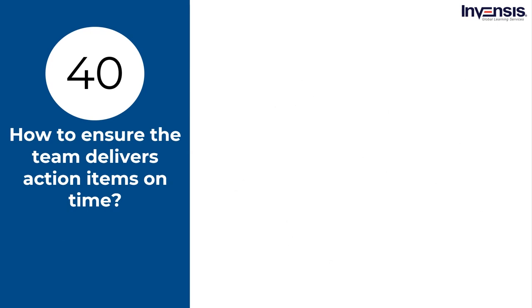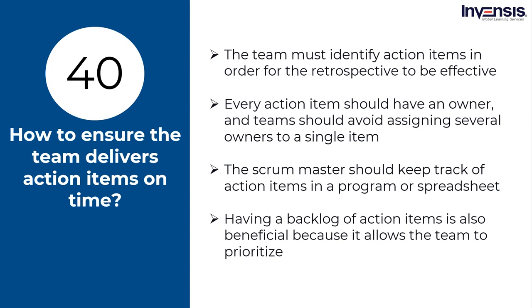How to ensure the team delivers action items on time? The team must identify action items for the retrospective to be effective. The action item should be closed as soon as possible, and the Scrum Master should take steps to accomplish this. Every action item should have an owner, and teams should avoid assigning several owners to a single item since ownership becomes diluted. The Scrum Master should keep track of action items in a program or spreadsheet available to everyone on the team. Having a backlog of action items is beneficial because it allows the team to prioritize. The team should go over items from the last retrospective and discuss their status so everyone knows what further needs to be done. A retrospective tracker categorizes action items into priority, ownership, status, description, identified date, and kind.